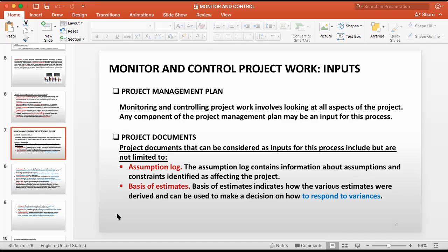And in this area, if you are going to do the excavation at night, there will be problems from the people. So the assumption is that in this area you have to work only on weekends and daytime. So we assume there will be problems. So the assumptions log can have so many things: technical assumptions, social assumptions, religious things, many things you can add. All these things are in the assumptions log.